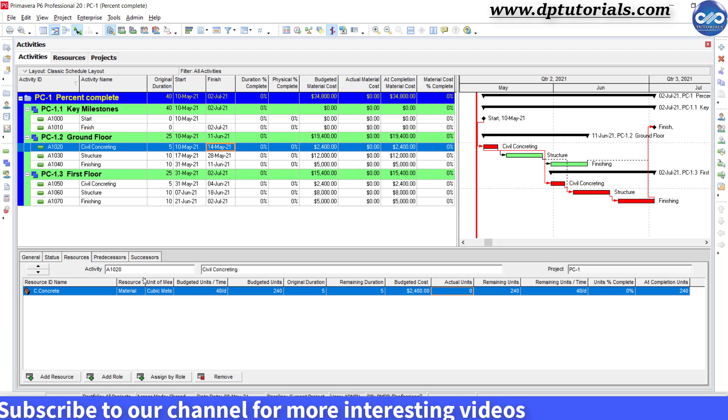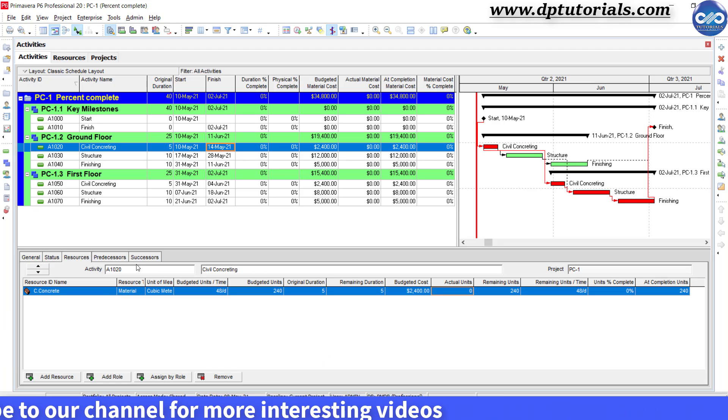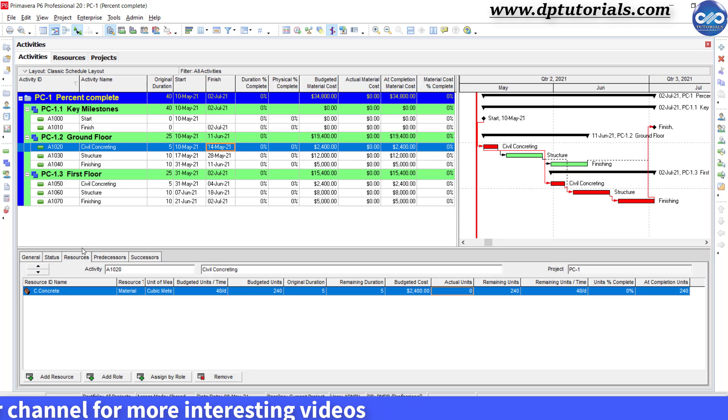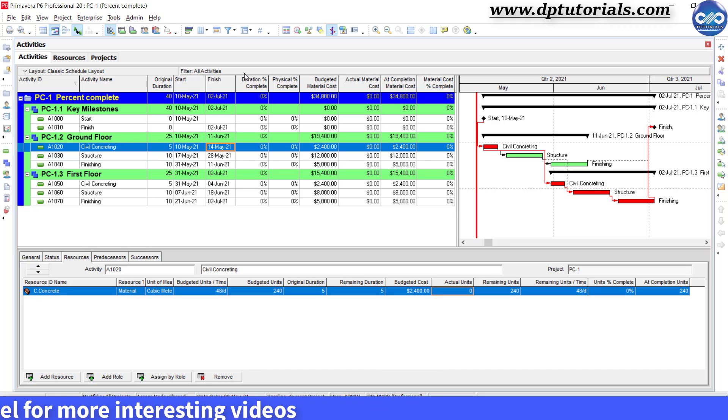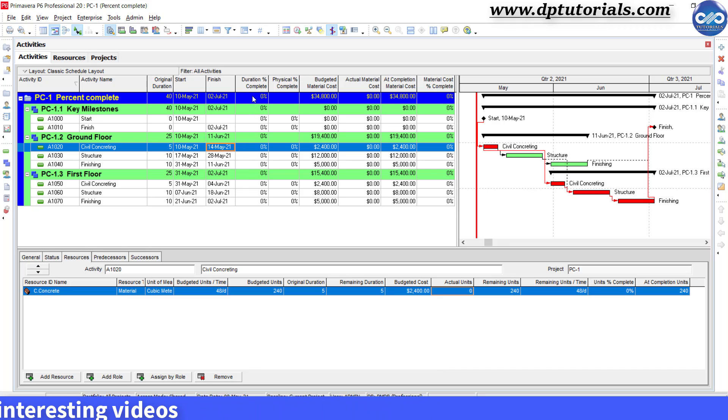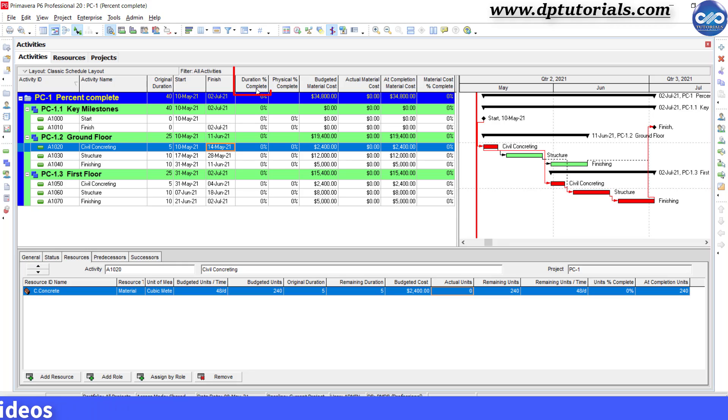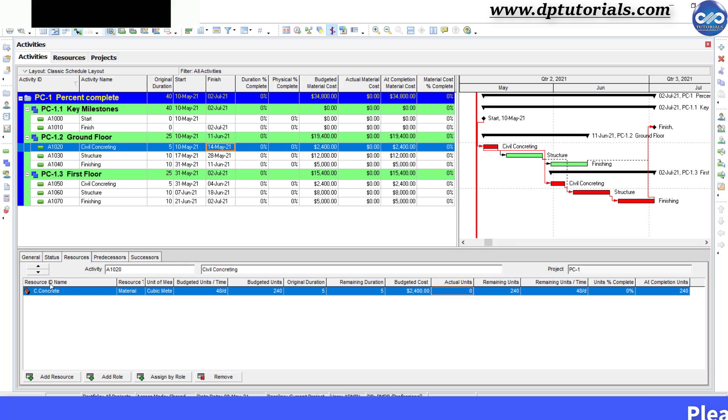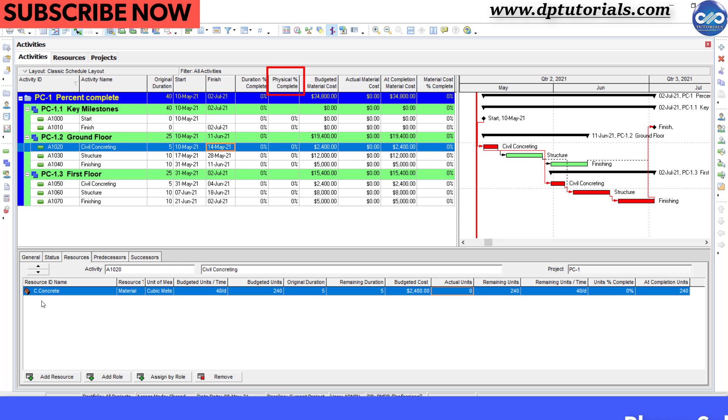Generally, we measure the percentage progress of any project by its duration completion, which is nothing but duration percentage complete. But now, with an example, let us see by the material unit of measurement, i.e. physical percentage complete.